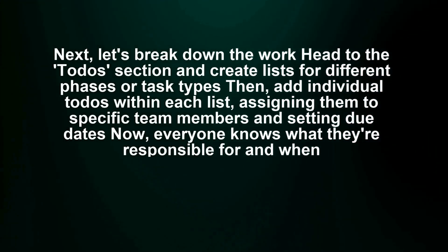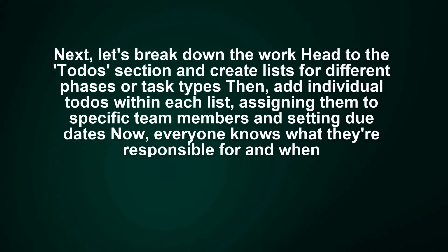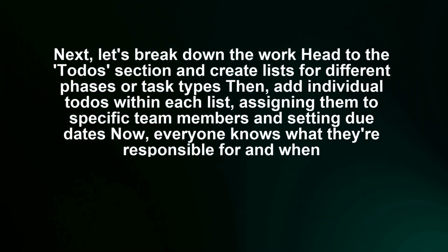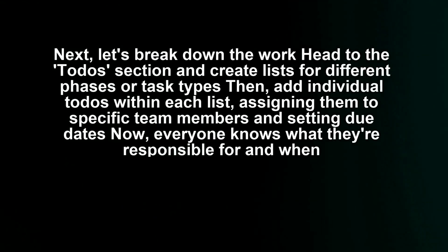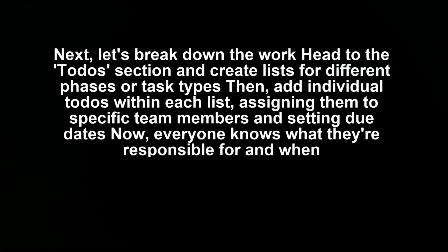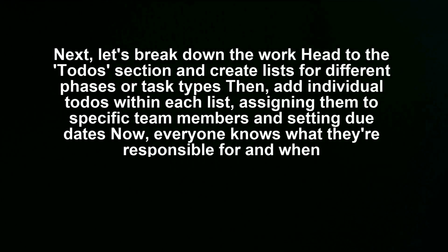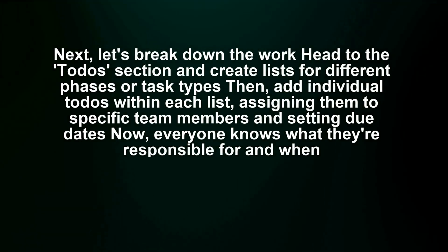Next, let's break down the work. Head to the To-Dos section and create lists for different phases or task types. Then, add individual to-dos within each list, assigning them to specific team members and setting due dates. Now, everyone knows what they're responsible for and when.